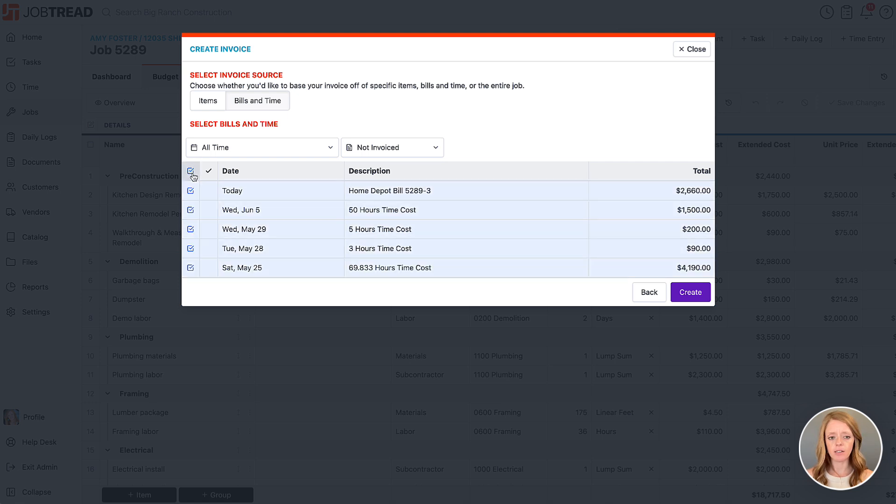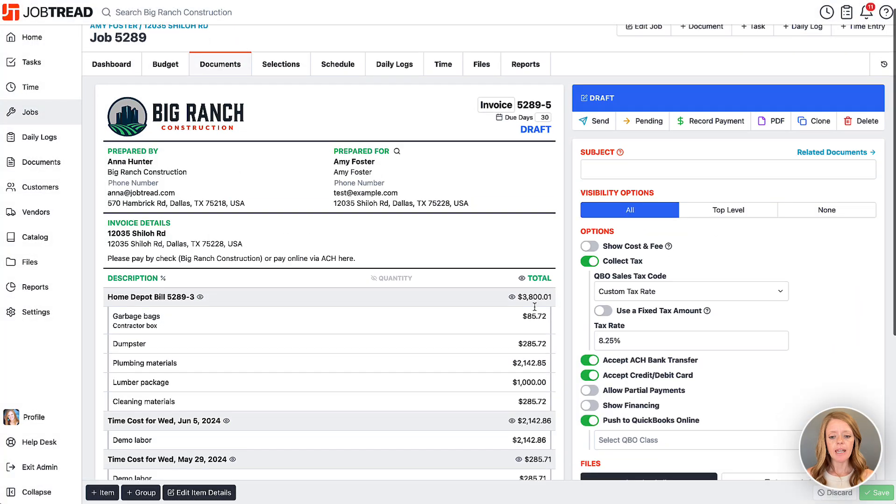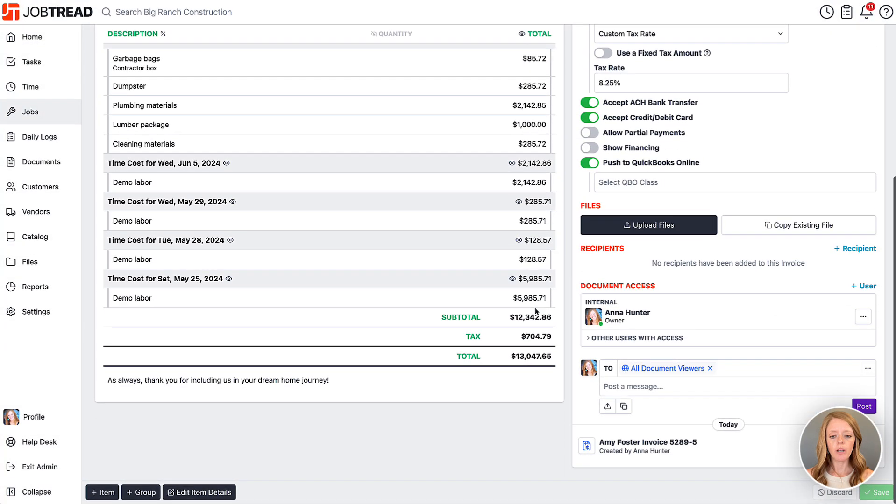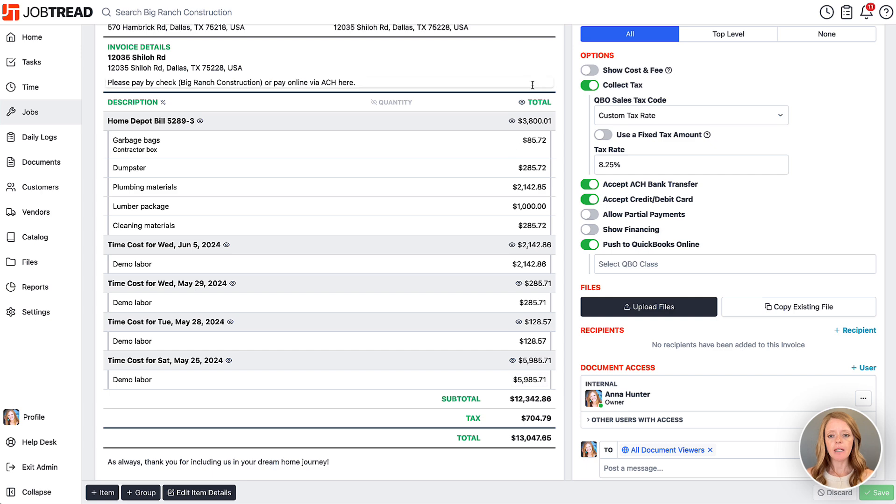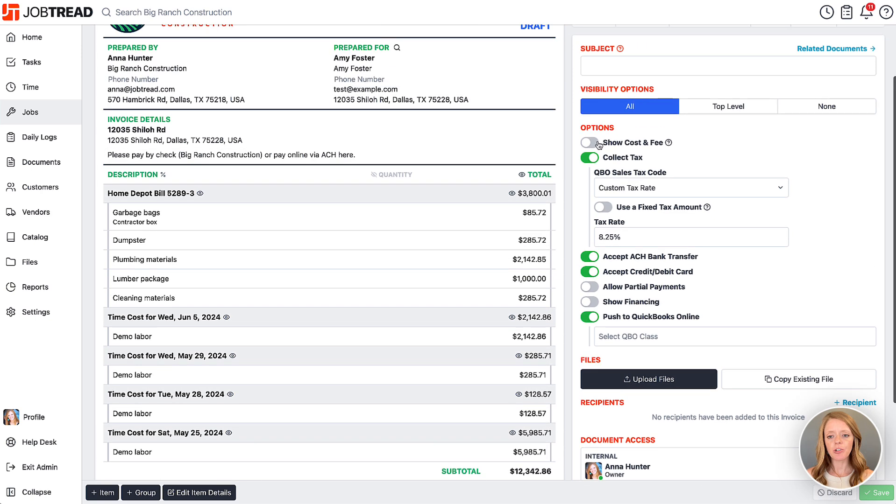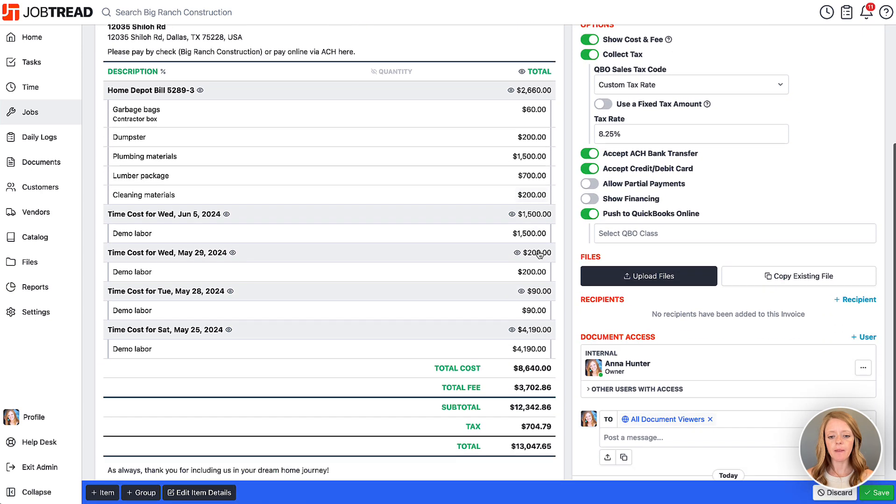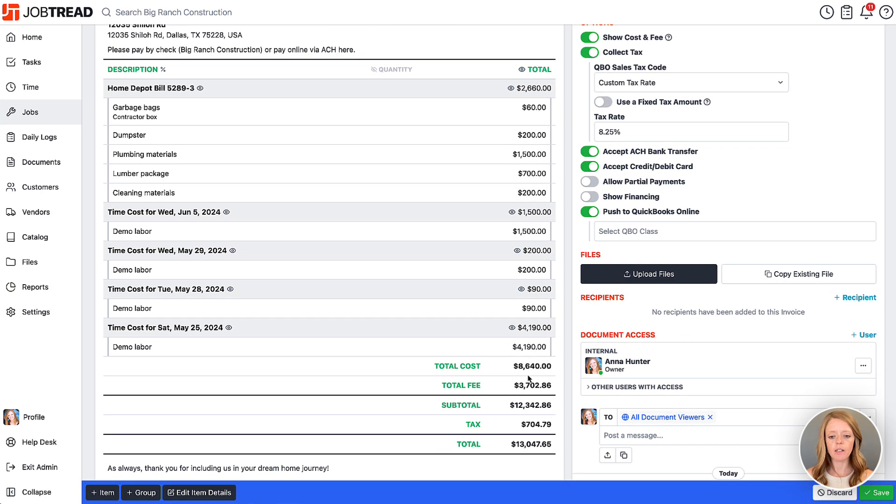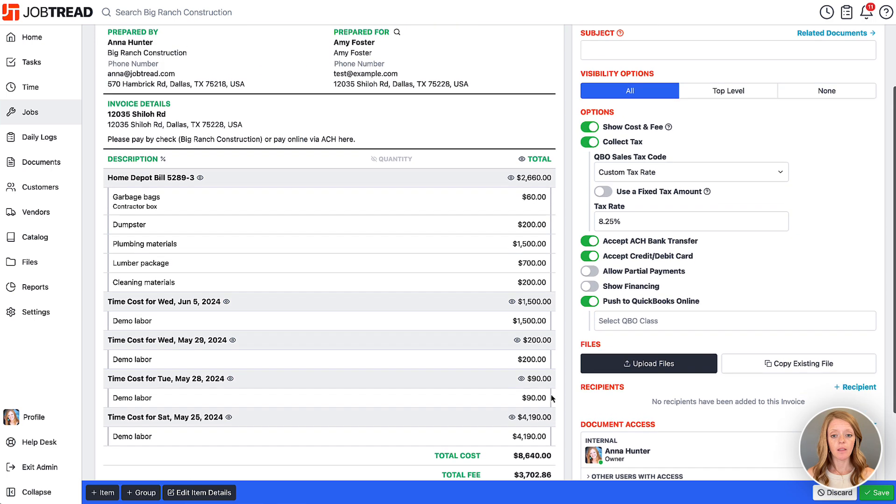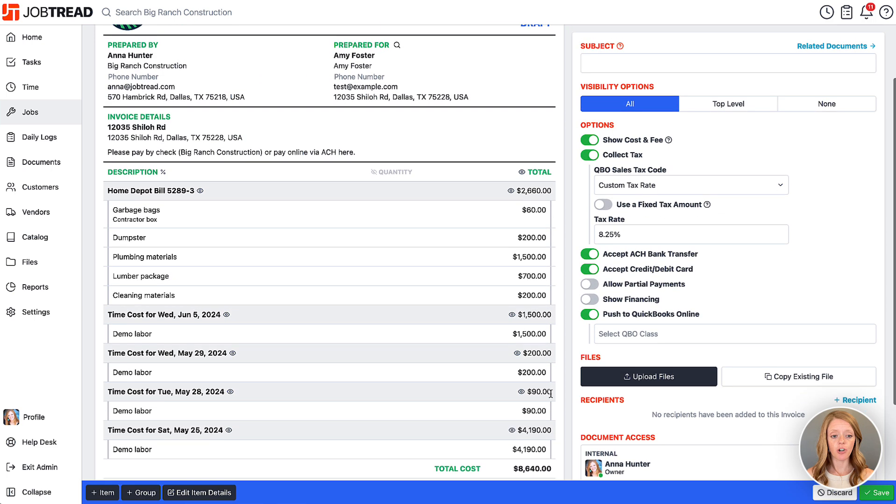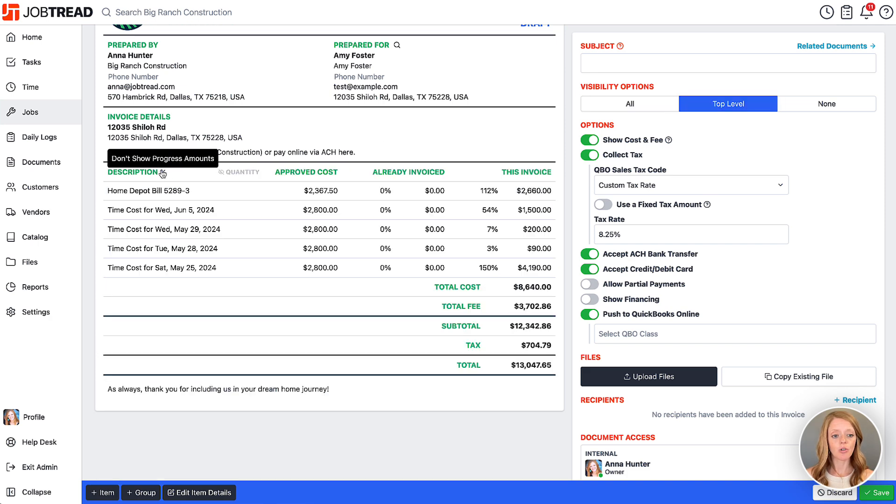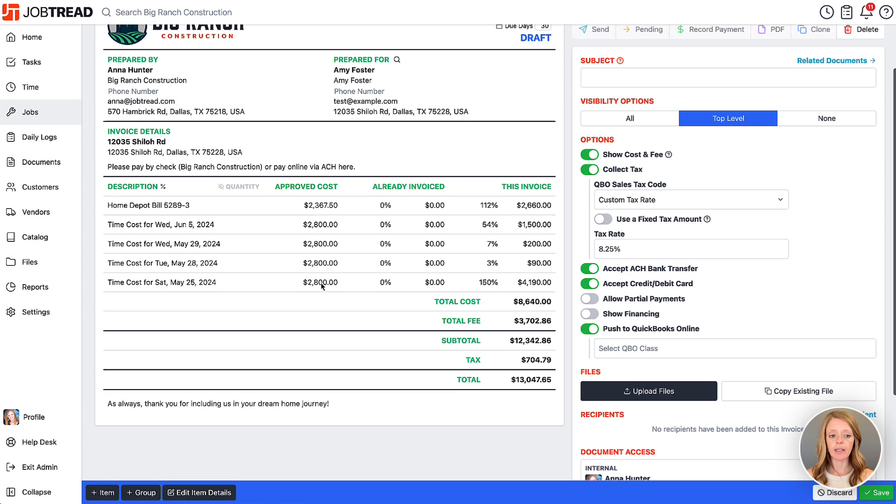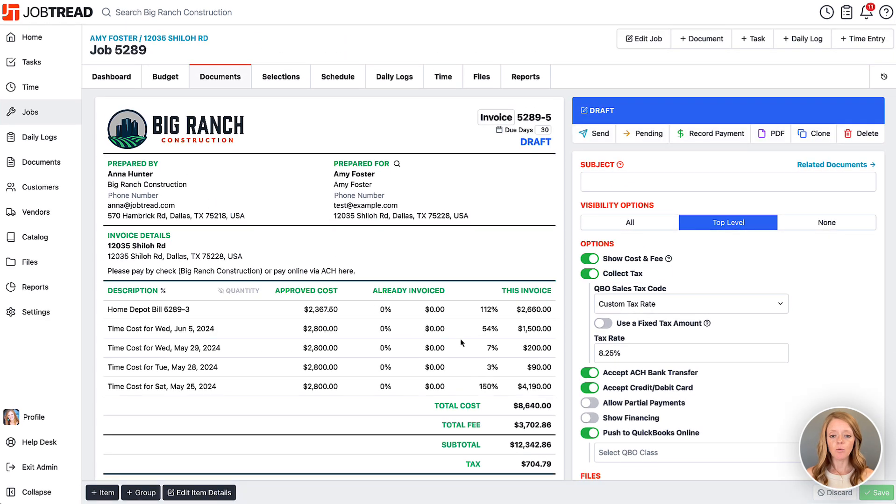Now I'll click create and it will show the total bills and time that we're passing along. I would encourage you to click show cost and fee, and that will show the cost of the project that we're passing on to the customer, and then additionally it will show your profits that you're going to be charging for. You can also show top level if you want to and you can show the progress amounts if you'd like as well. Now we can save that and we have a cost plus invoice.